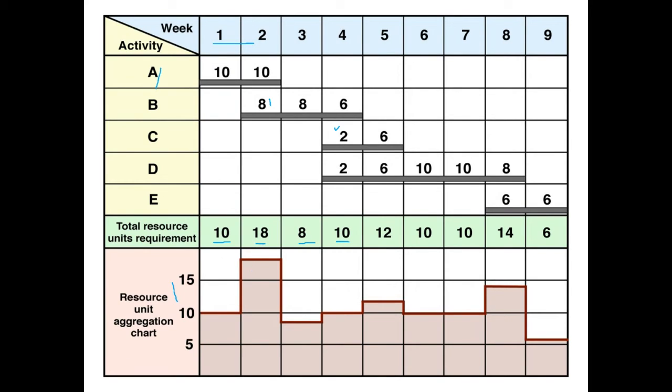So in week 2 you require 18 workers, and then are you going to fire them, and they will be just sitting idle for week 3, because you're requiring only 8, and then week 4 also. So from week 3 there's a very certain peak demand. So basically we do not like to see too many peaks and troughs.